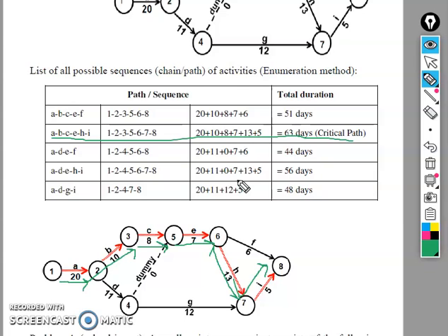But the most interesting thing is that if the design is so complicated, you can find so many different paths. Here the number of paths is only 5, so you can easily observe all 5 path durations and find the highest duration path, which should be the critical path. But if the drawing is complex and has say 50 paths, then it's very complicated to check all 50 paths and then chalk out the critical path and so on. It's very complicated.